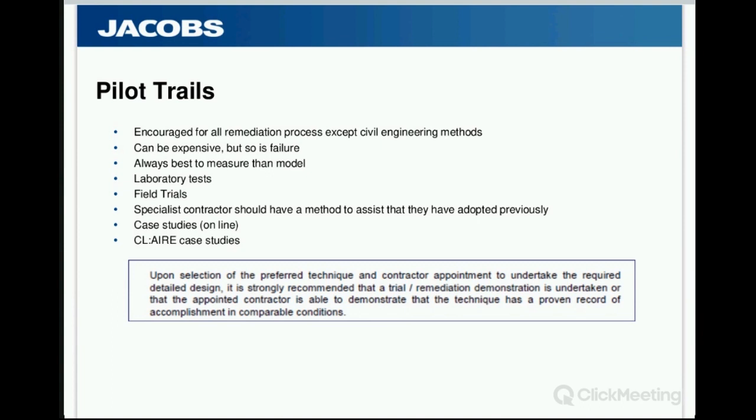There's actually remarkably little UK guidance on pilot trials. So probably the best thing to do, and they are all very bespoke, is that once you've identified your solution that you think is the most viable, is to speak to a contractor. This is what I've always done on every occasion, and they'll normally have a pilot trial methodology which they use to satisfy themselves that the method can be achieved, which they will lend you and implement.